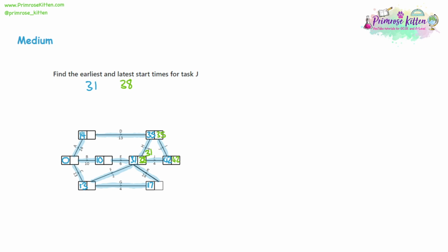So when we do the diagram, we have to write 31 in that box. Because again, it's not start times, it's actually end times for the three tasks that feed into it, which I'm highlighting. E, F, and K have to be done on exactly 31. There's no wriggle room, because then they have to be finished in time for H and I to happen. While J could start earlier, J can start later, you need to get them done for H and I, so you can't wait around.